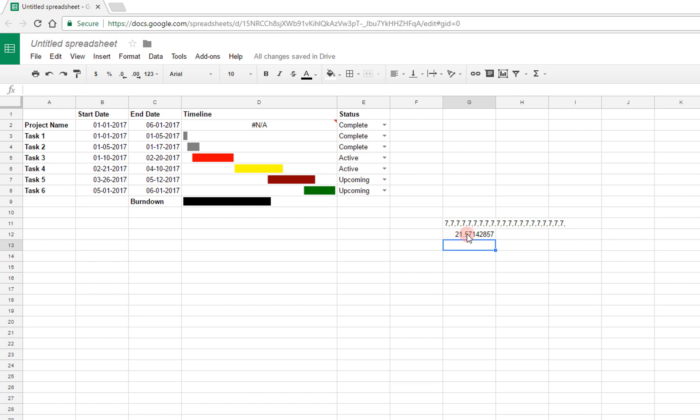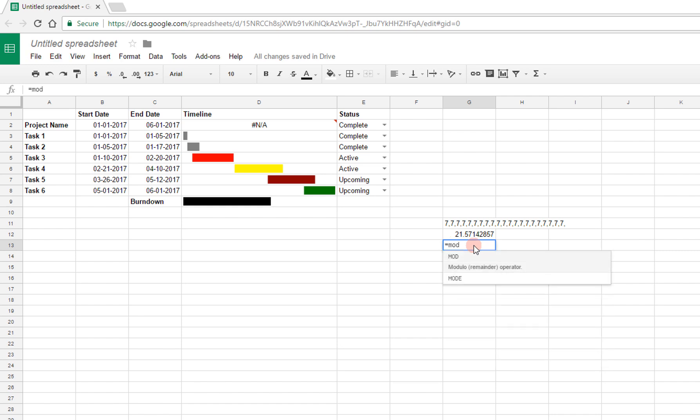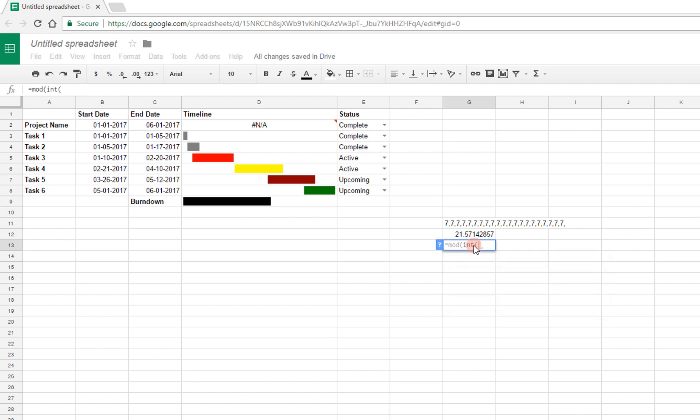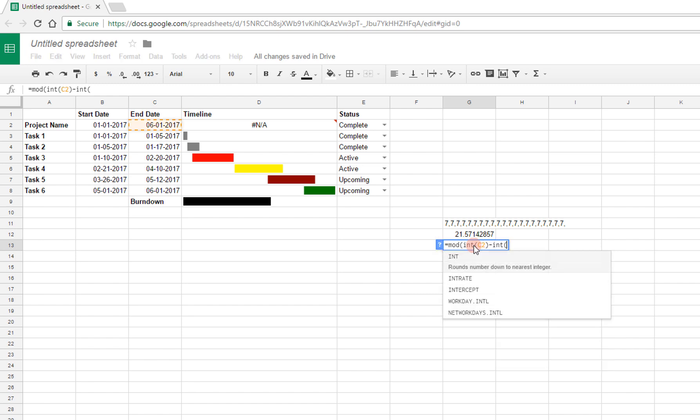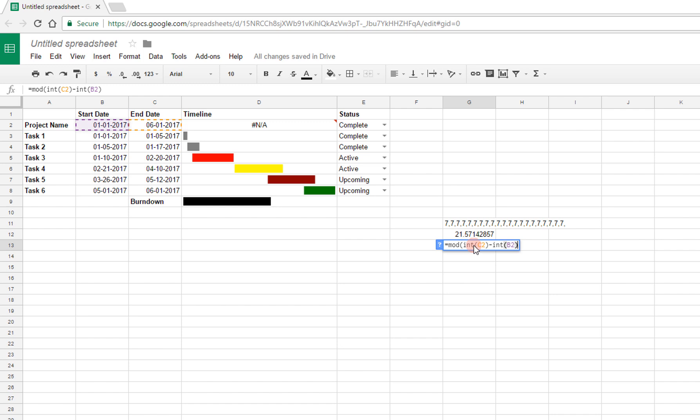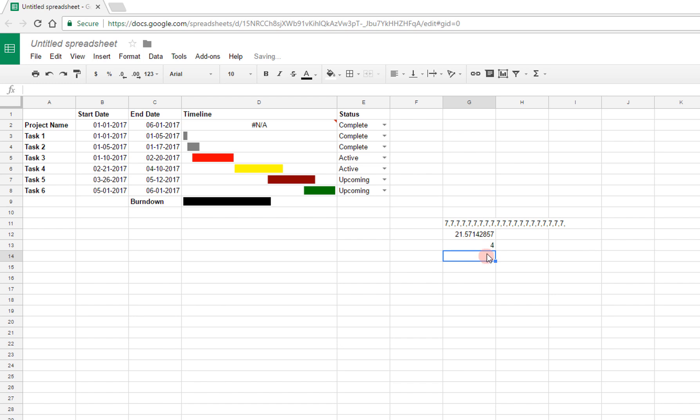However, I also then have a little remainder, and basically what I would then want to do is add another number to here, corresponding to the rest of the number of days that there are. And so for that I can use the mod function. I can say mod, the modulo function, int C2 minus int B2, and then what I want to divide that by to find the remainder by 7, and you see there are 4 days left over here, so that's what I want to tag on to the end.